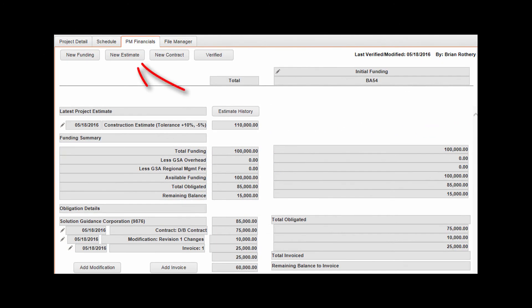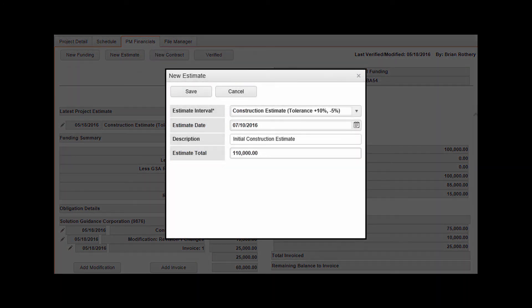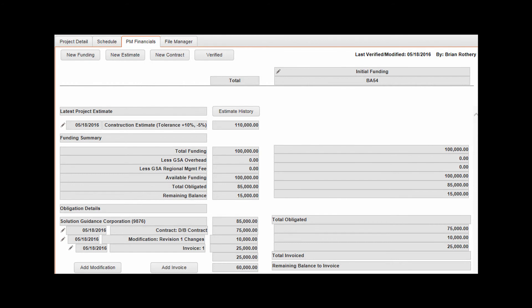Click New Estimate in the toolbar. Populate required fields as highlighted and additional fields as needed, then click Save to continue. Repeat the steps as needed to record a history of all estimates on the project. To review the estimate history, click on the Estimate History button above your current estimate amount.